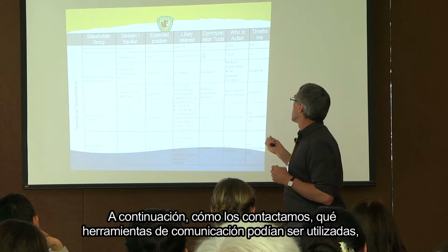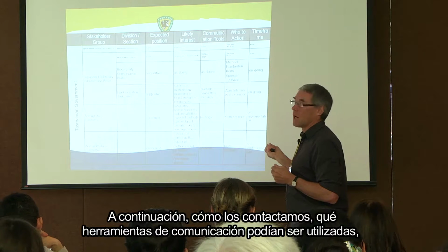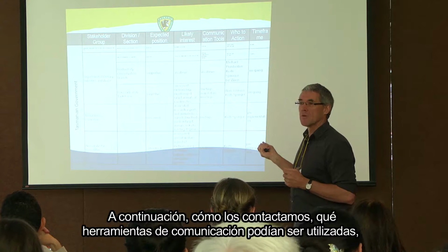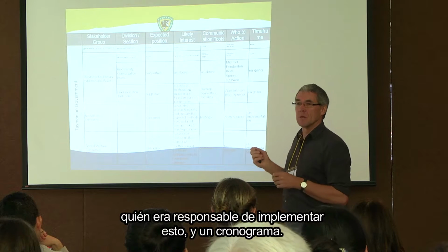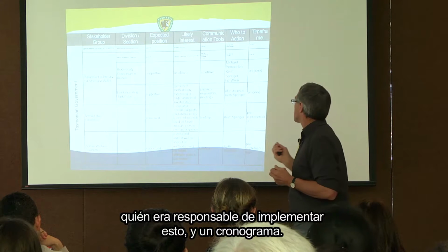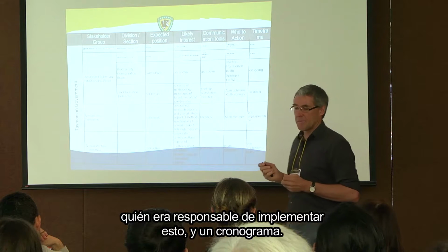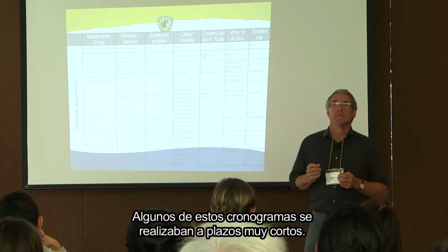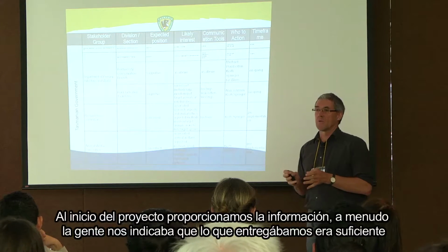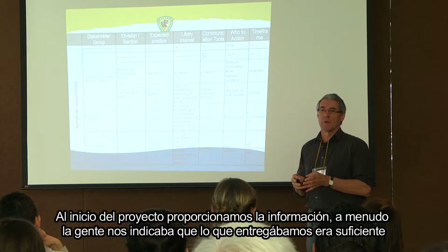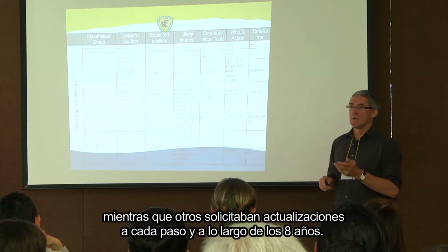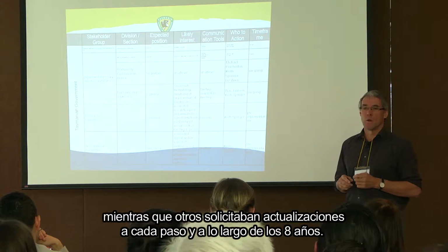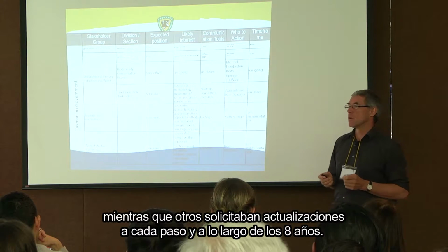and then carrying on how we would reach them, what communications tools could we use, who was responsible for implementing that, and a time frame. And some of those time frames were very short term. At the start of the project we would provide information, and then often people would say, fine, that's all I need. Others wanted to be kept updated all the way through an 8-year project.